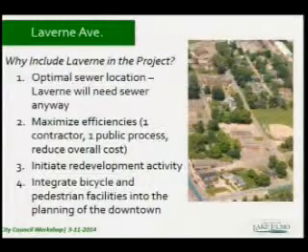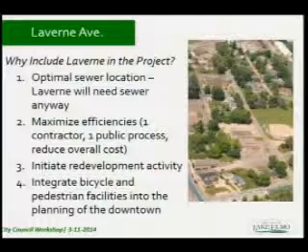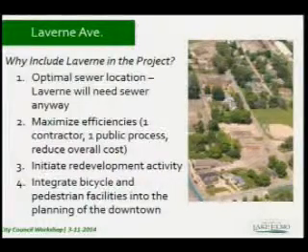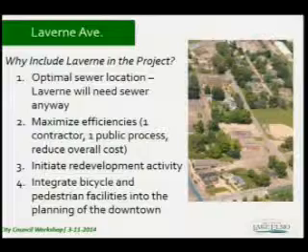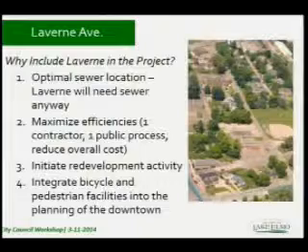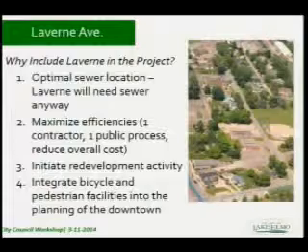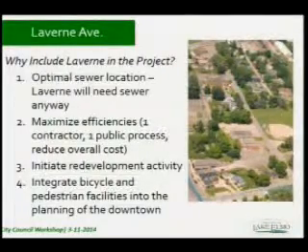And finally, number four, integrate bicycle and pedestrian facilities into the planning of the downtown. As part of all county projects, the county is always going to be looking for ways to integrate other types of transportation, multimodal, meaning bicycle and pedestrian facilities. What we found in the Lake Elmo Avenue corridor is with having those expanded sidewalk areas and trying to really get that nice streetscape is that you don't actually have enough existing right-of-way within Lake Elmo Avenue for any type of trail or on-street bicycle facility. That doesn't mean that people on bicycles certainly won't be able to use that on-street, but in terms of a dedicated striped lane or any type of off-street trail, that won't be in the cards.